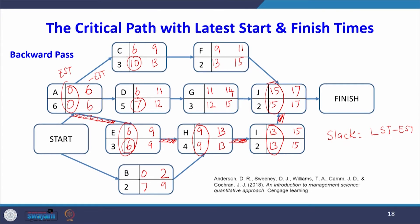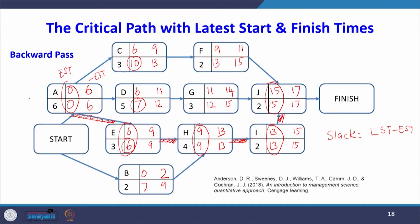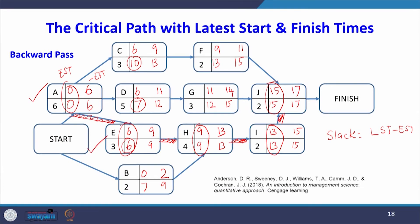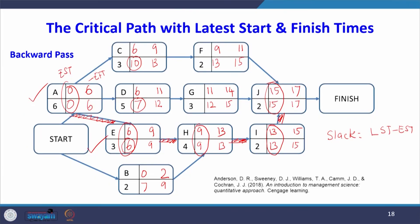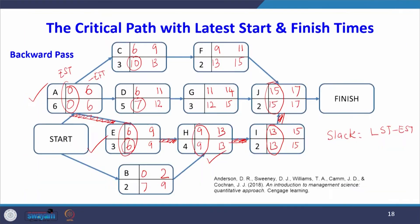These critical activities cannot be delayed at all. If we delay any critical activity, the project duration will be extended beyond 17 weeks. The critical activities are A, E, H, I, and J. Apart from this critical path, the non-critical activities have a schedule with earliest and latest starting and finishing times.